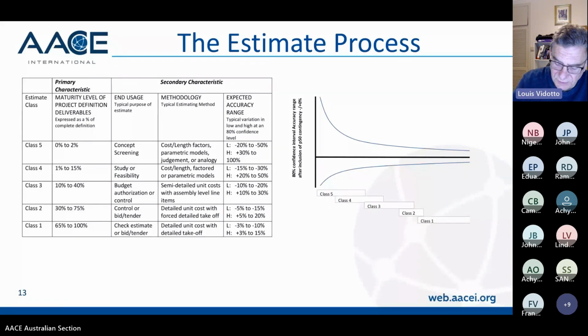We've done a fair bit of analysis now on different types and sizes of projects, and we think that if you know what the equipment estimate looks like, what sort of value, then there's enough data from history and projects to be able to determine what the capital cost for the directs looks like, and also what the capital cost for the indirects looks like. And obviously based on where the project is and what region and what type of project. But certainly for that sort of level, understanding what the equipment looks like, it might be a primary crushing system for a mine, which might cost you $2 million. So then you might think that the capital costs are going to be something like $20 million or something like that.